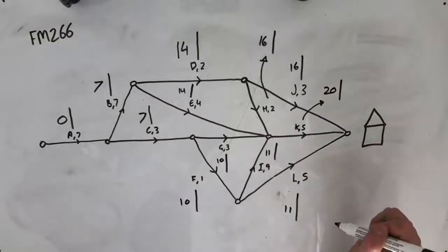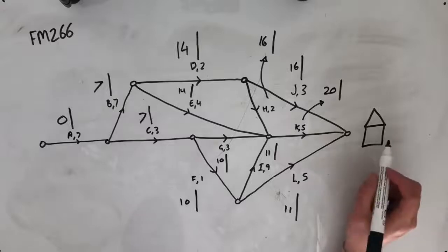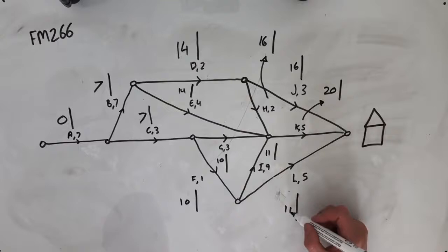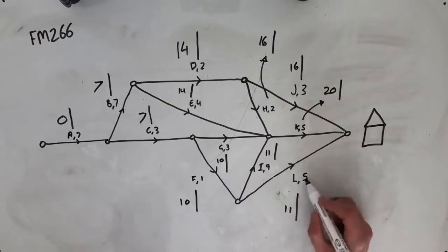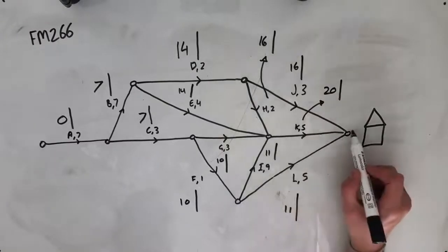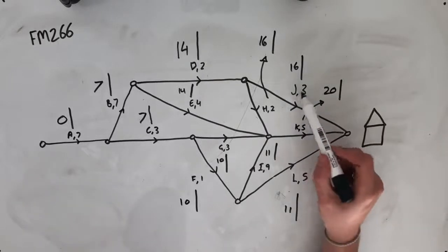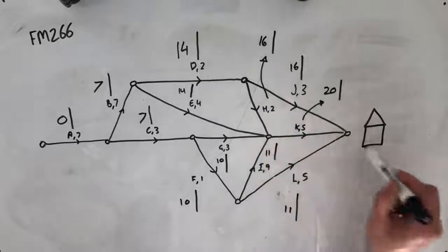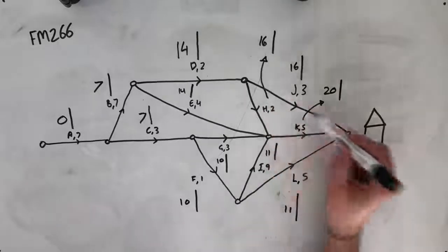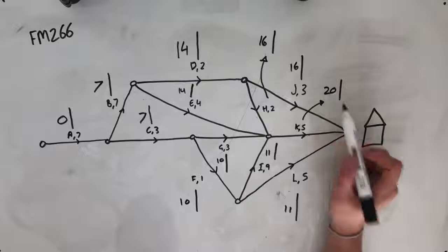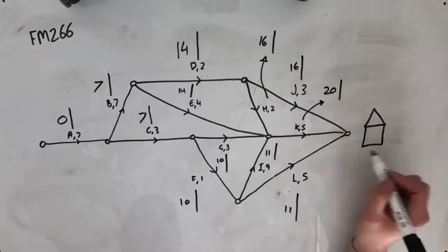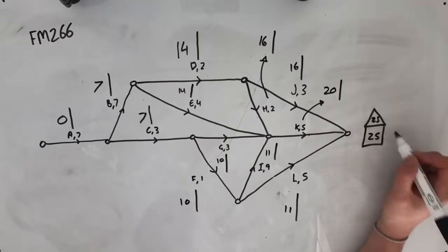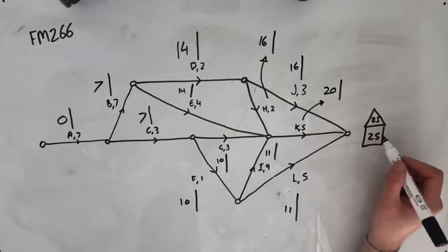And then for our final little bit here, coming into the finishing end of the project, we have 3 options. Early starting time of 11 for L and 5 days is 16. Early starting time of 16 for J and taking 3 days is 19, so we've got completion times of 16 and 19. And then K, starting on day 20, taking 5 days is 25. Once again, we take the biggest number there, that 25, and that is the earliest completion time of the project.